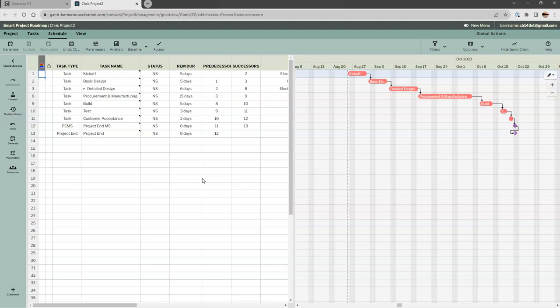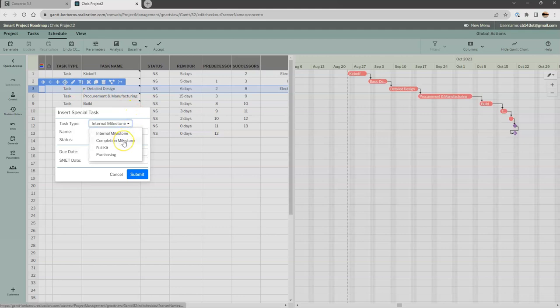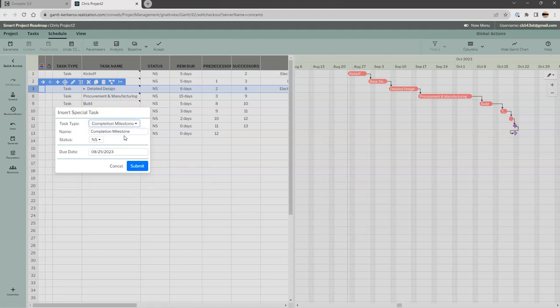In this simple project plan, I'm going to add a milestone to help focus our engineering effort. We really want to drive the project to get the end of detailed design on time. We know that if we delay getting to the end of detailed design, those delays will propagate through the rest of the project and will be very difficult to recover. So we want to focus our engineering capacity — it gives engineering something to focus towards.